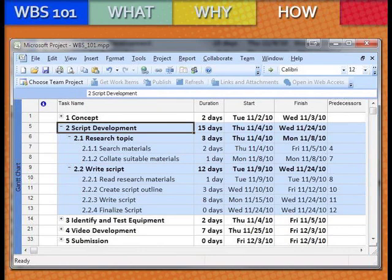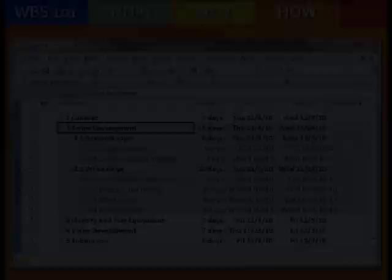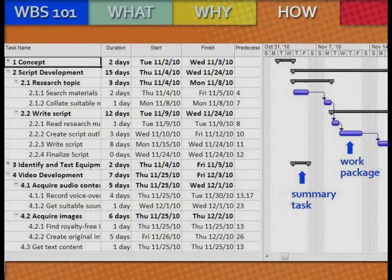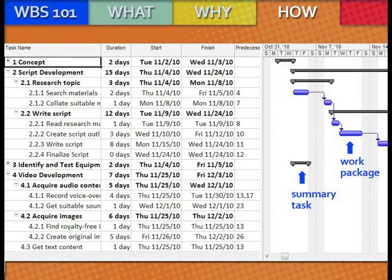Work packages are the lowest level of the WBS, as you learned earlier. Read Research Materials, Create Script Outline, Write Script, and Finalize Script are the four work packages decomposed from Write Script. Together, this work took 12 days to complete. The Predecessors field displays a number for each work package to calculate the progress of the project in terms of days. The Start and Finish fields are extremely efficient in preparing a visual aid by creating a timeline based on the dates you enter. The black lines in this timeline represent the tasks and summary tasks, while the blue lines depict the work packages. This grid has weekly dates at the top to track the progression of your project.